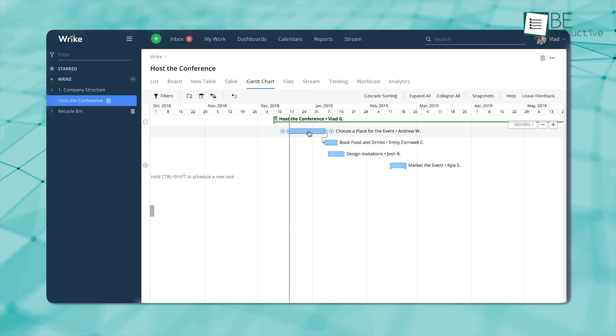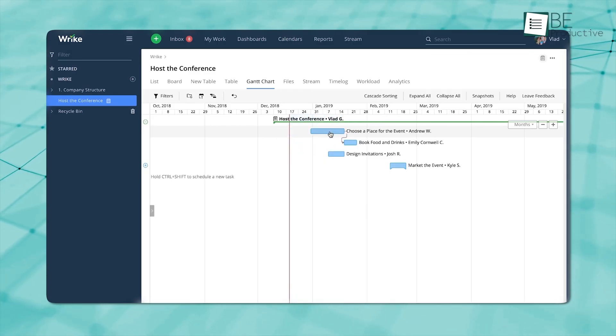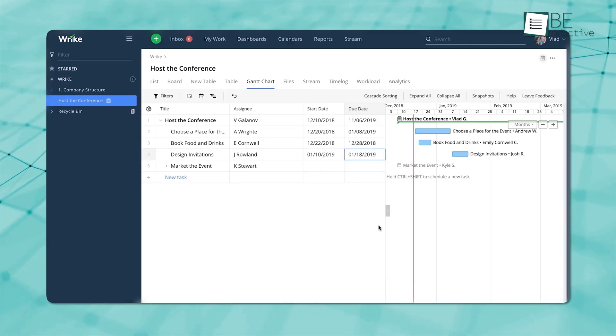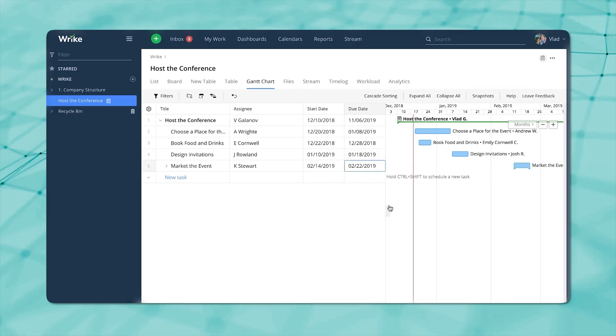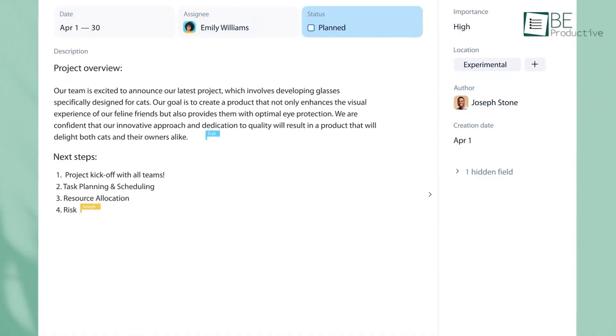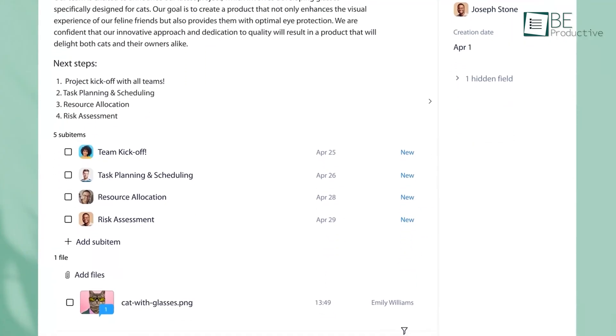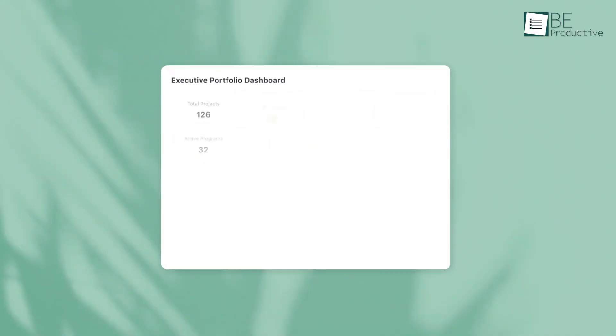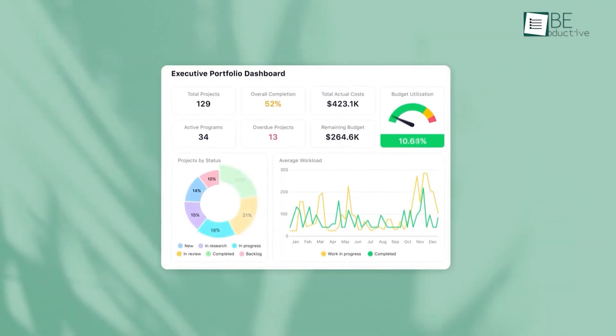You can move tasks around with drag-and-drop functionality, and when you shift a deadline, it automatically updates related tasks, which gives you a real-time view of what's affected. Wrike also comes with advanced portfolio management tools that are great when you're running several large projects. Its reporting lets you build customized dashboards and pull real-time data to track performance and see how resources are being used.